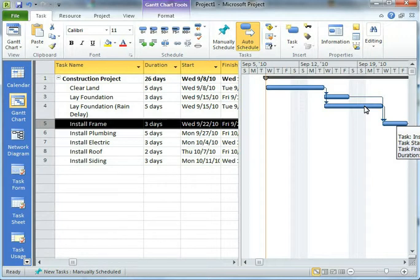Or if I have individual resources, maybe a PM or somebody like that assigned to the activity, well, they're going to show up as being over allocated. They're allocated to two activities at the same time. That's where the inactivate task bit comes in.